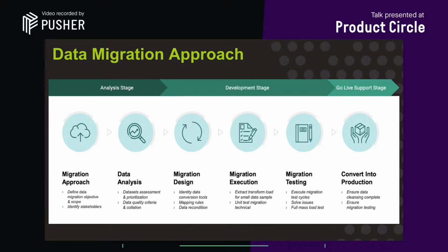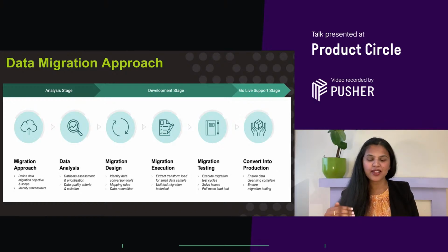The next key stage is development, where we design, build, and test. As part of the design phase, we came up with a high-level enterprise architecture. After that, we went through the buy or build process, where we did technology or tool selection based on scale, complexity, ease of adoption, business value, cost, and time to market. Then we defined and documented all mapping and translation rules.